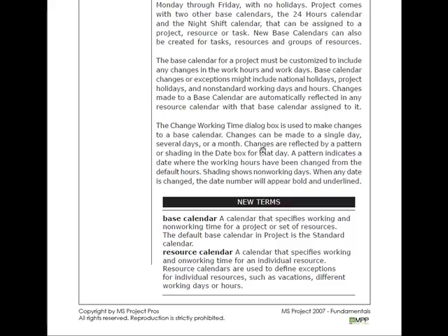So the first thing we want to learn about is understanding and working with base calendars. As you start to create your schedules, one of the first things you'll notice is that each project will have a very specific base calendar. This is where you're going to want to put in the standard working time. In this case, you have 8 to 5 as the default settings. This is where you're going to want to put in very specific company holidays.